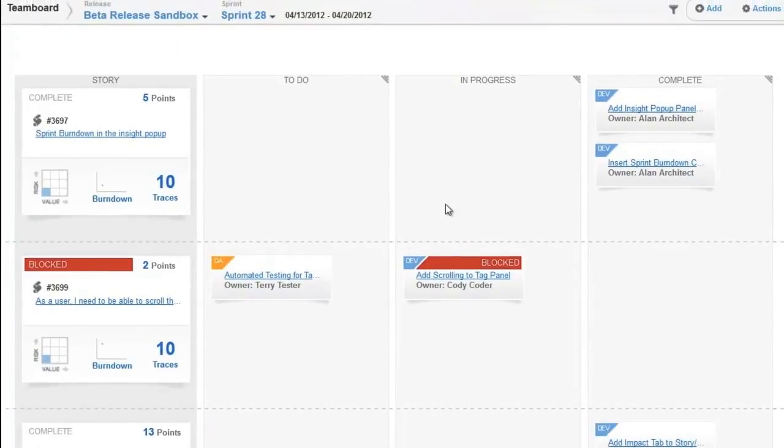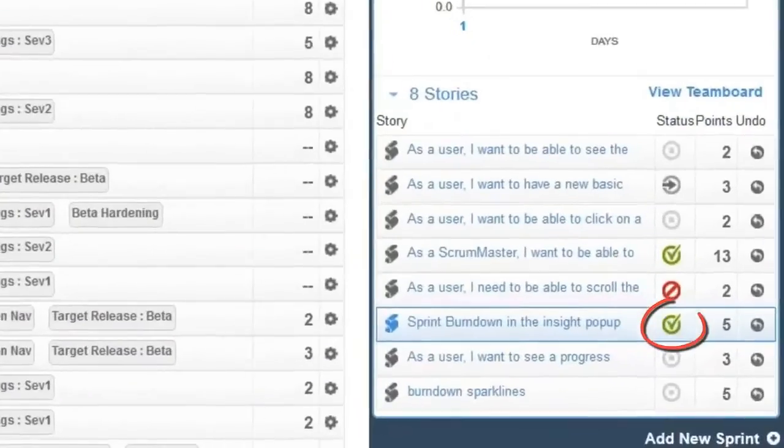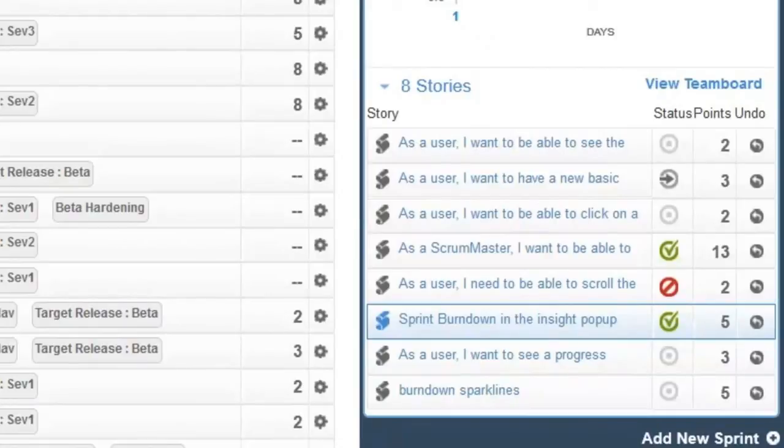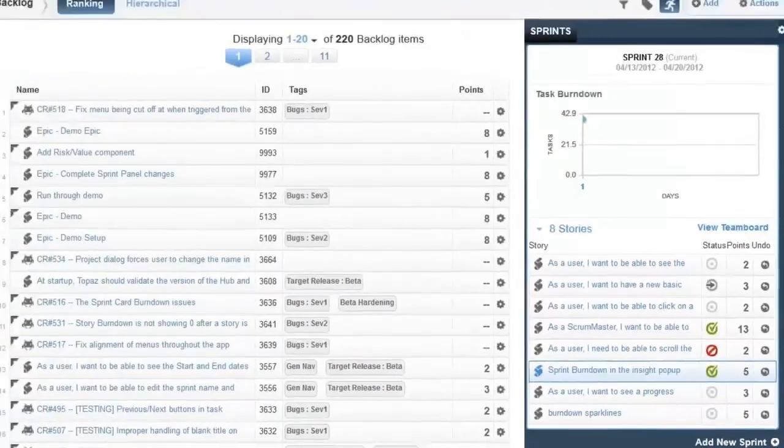When all of the story's tasks have been finished, the story's status is marked complete on the team board and on the sprint planning panel so that everyone has visibility into the team's progress towards completing the sprint's goals.